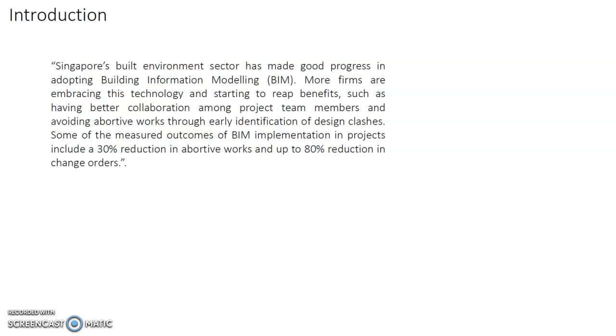Some of the measured outcomes of BIM implementation in projects include a 30% reduction in abortive works and up to 80% reduction in variation or change orders.